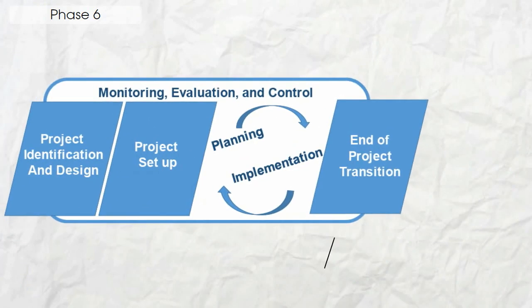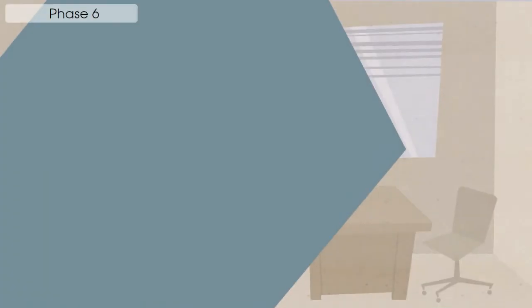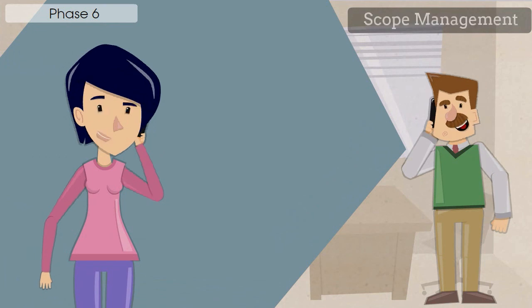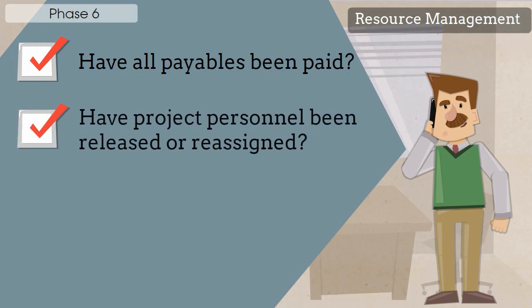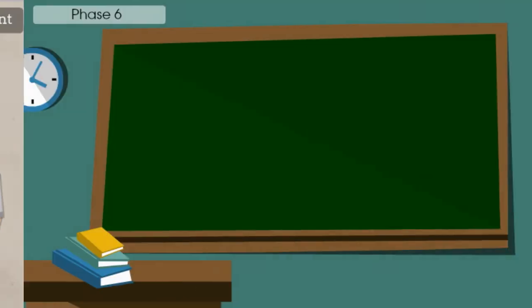No matter how the project ends, a good project manager should have an end-of-project transition strategy, which was first developed at the very start. Project closure means that internal and external stakeholders have verified the project scope and acknowledged that all deliverables have been met, and that contract, financial, and administrative closure is complete.